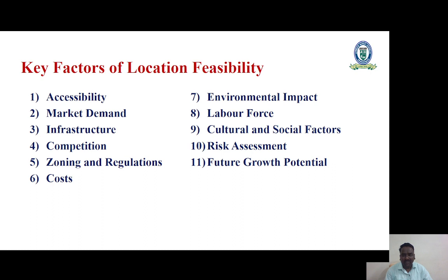There are 11 key factors of the locational feasibility. They are: 1. Accessibility, 2. Market demand, 3. Infrastructure, 4th. Competition, 5th. Zoning and regulations, 6th. Cost, 7th. Environmental impact, 8th. Labor force, 9. Cultural and social factors, 10th. Risk assessment, and 11th is the future growth potential.